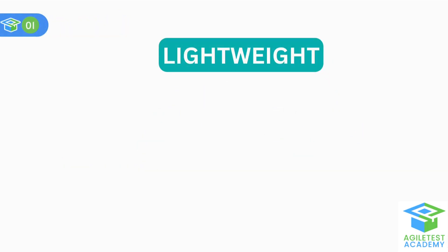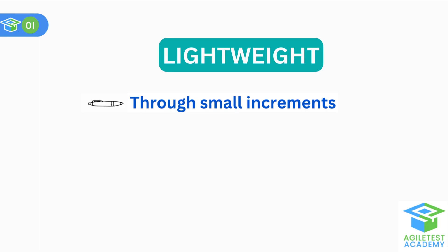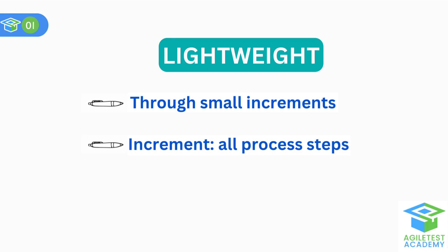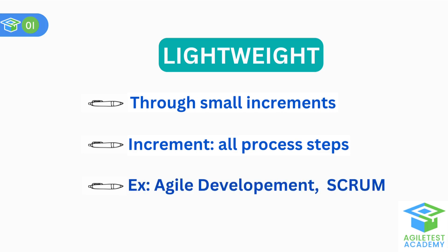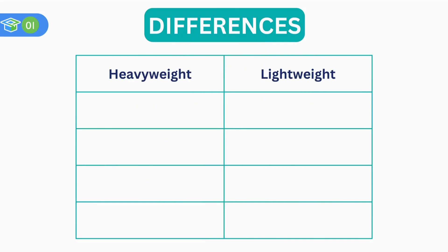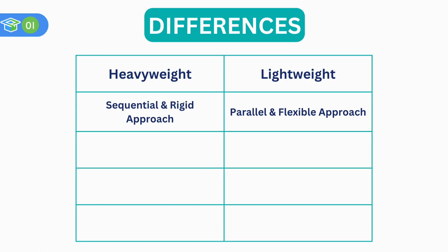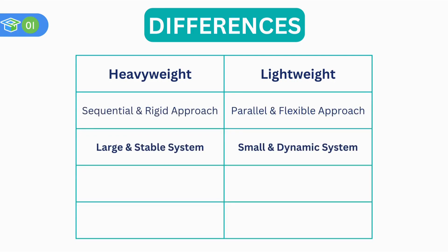Lightweight method is when the development team releases working software in small increments and develops the plan incrementally. Each increment includes all process steps and there is an expectation that changes will be made based on the team's experiences — for example, agile development and Scrum. The main difference is that heavyweight uses a sequential and rigid approach, while lightweight uses a parallel and flexible approach. Heavyweight methodologies are suitable for large and stable systems, while lightweight are suitable for small and dynamic systems.